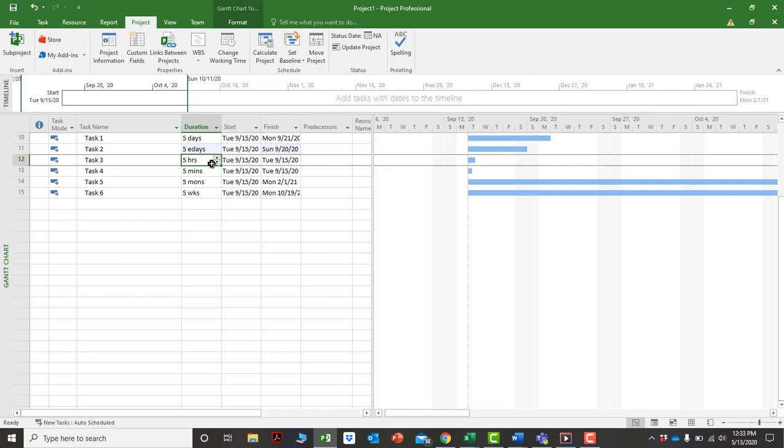In another video, we'll talk about how you can change and adjust the calendar to suit your purposes. The default is typically a 40-hour week, working 8 hours a day, Monday to Friday, and not working Saturday and Sunday. Of course, we can make this program work whenever we want. So we have full flexibility on however we want to set it up. That's just giving you an idea of how that's structured.